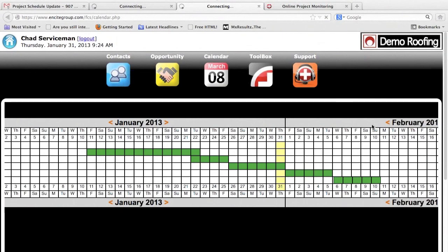Are you over on your hours? Are you going below budget? For you guys to better understand where your laborers are coming in, if there's any change orders, obviously, and how those two match up. So you will be able to base that not only on square foot, but also on labor reported if you guys are a user of FCS time.